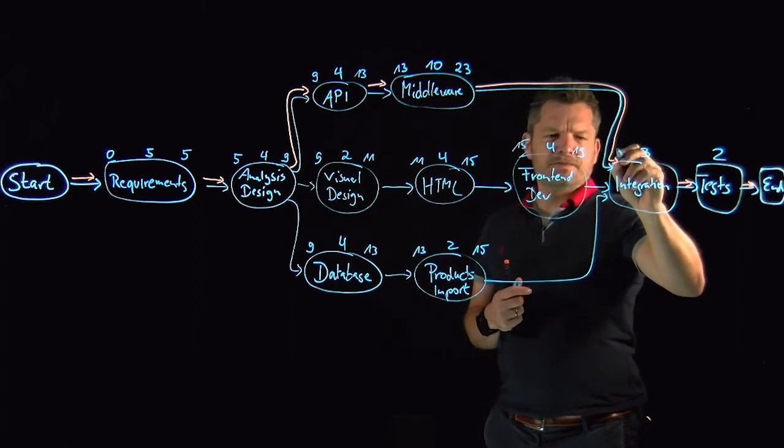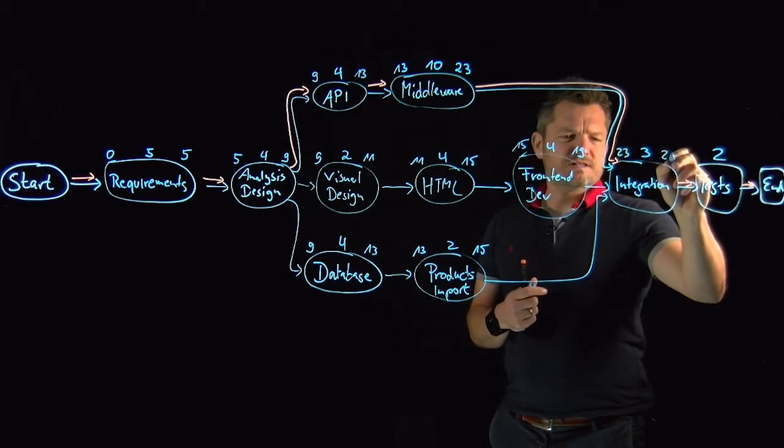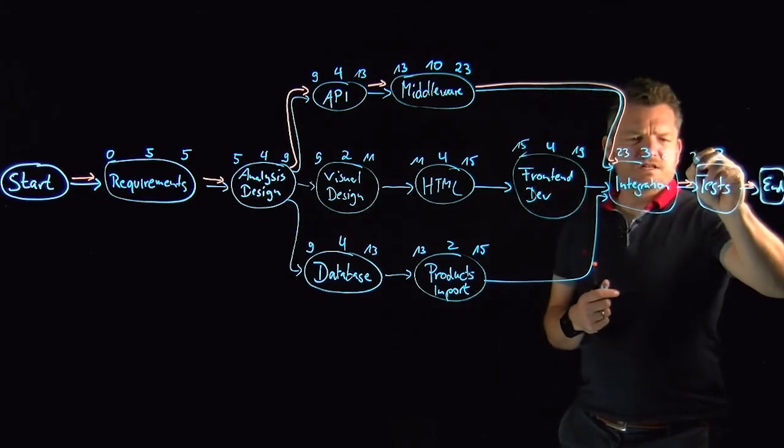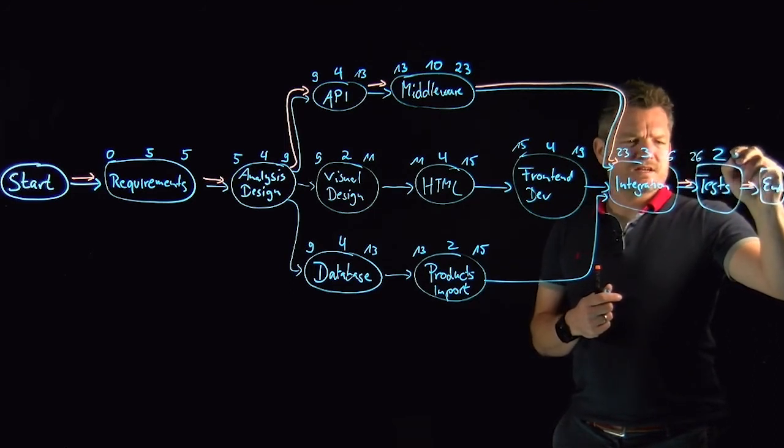So twenty-three plus three, twenty-six. Then we start with the tests in the end, the acceptance tests, and we have twenty-eight.